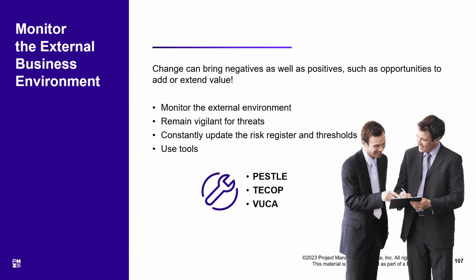But having said that, if the external environment of the business has changed, we may have to re-evaluate our feasibility study. Naturally, we are not going to be involving the business analyst, but because the business case is now the property of the project manager until the project ends, the project manager is responsible for re-evaluating the external business environment and updating the business case.